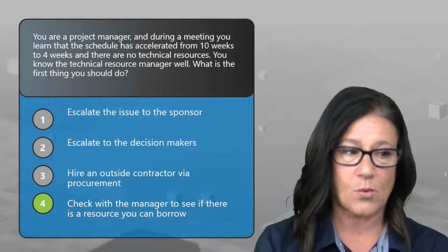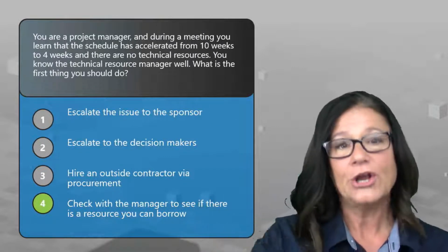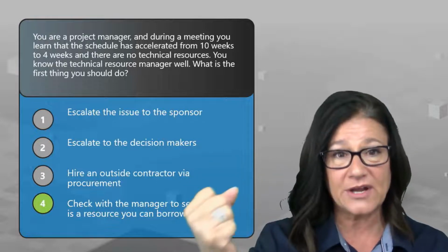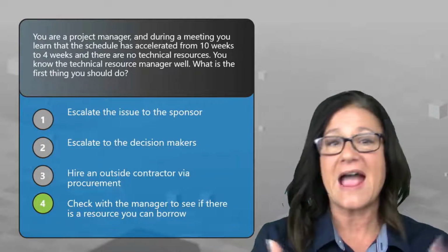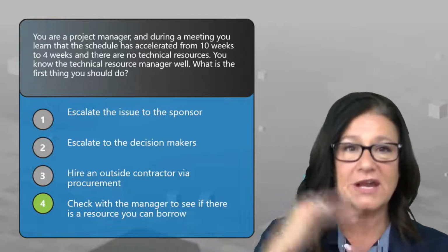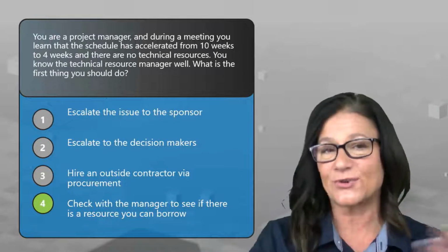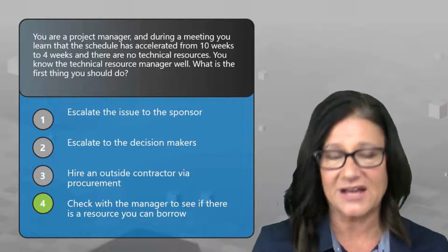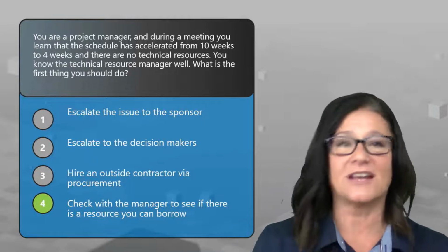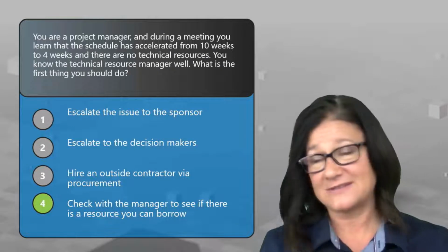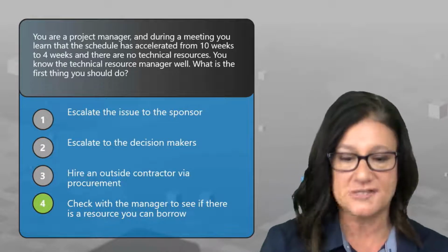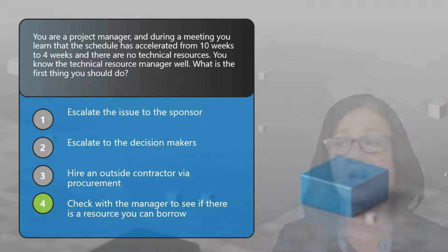There's only 2 reasons why an escalation would be a correct answer. The first one is it's a threat or opportunity event that we cannot get rid of or gain on at the project level. Like, we have to go above. The threat event is very real, very impactful, but we can't deal with it. We can escalate that. The only other escalation answer that would be correct is that you've got a stakeholder you cannot deal with, period. You're like, I've tried everything and I just can't get through to this person, you can escalate to your sponsor. But Dave, you got it. That's exactly right. So ask yourself, like, can I solve this problem? Or is it unsolvable, like a risk situation that might come up? So good. 4 is the best answer.